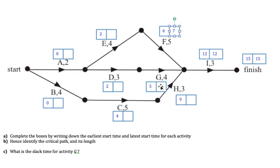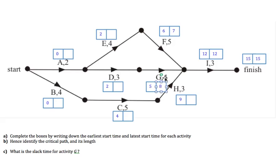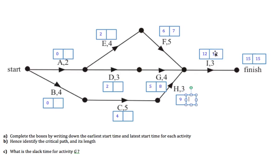Activity G also needs to finish in time for I to start at 12. Activity G has a duration of 4, so it must start at the latest by 8 — if it starts at 8 and takes 4, then I can still start by 12. Likewise for H: H takes 3 and needs to finish by 12 so that I can start. Therefore, the latest possible time that H can start is 9, because 9 plus 3 equals 12.